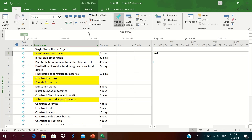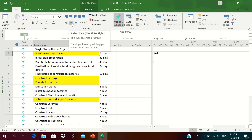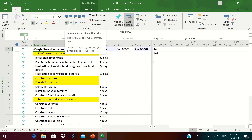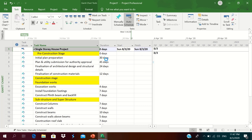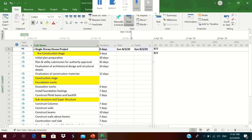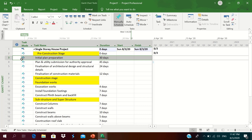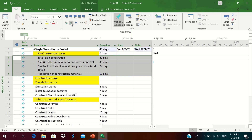Now we need to group all these activities under their WBS, starting from the beginning. The pre-construction stage comes under the single housing project — we indent it by clicking the indent button. We can indent or outdent tasks. We select activities and indent them under the pre-construction stage.